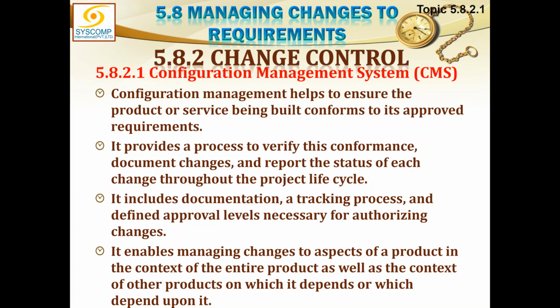Configuration management helps to ensure the product or service being built conforms to its approved requirements. It provides a process to verify this conformance, document changes, and report the status of each change throughout the project lifecycle. So from anywhere you can trace back and look at the configuration management system and find where the requirement has changed.